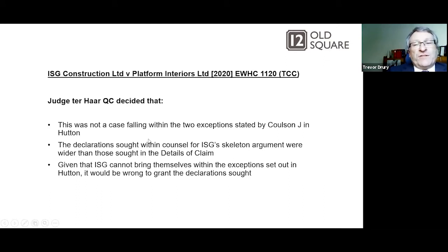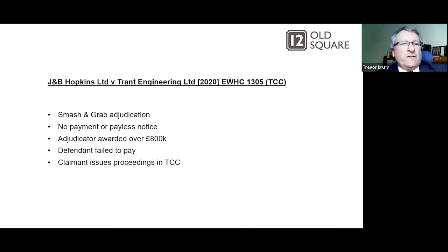the judge actually decided that money should be paid across to Platform, even though it was clearly wrong. So it's the pay now, argue later approach, which the courts have continued with over the last 20 years.